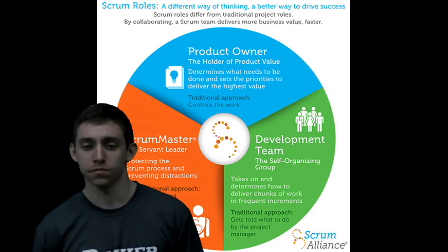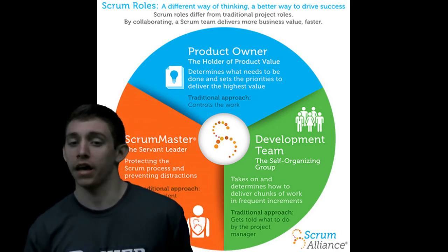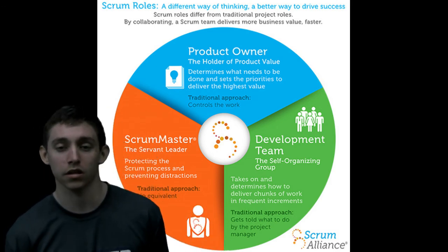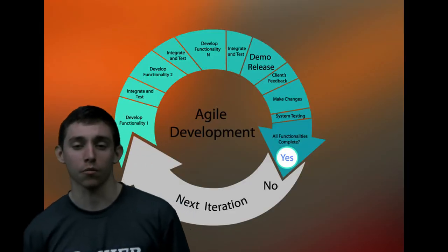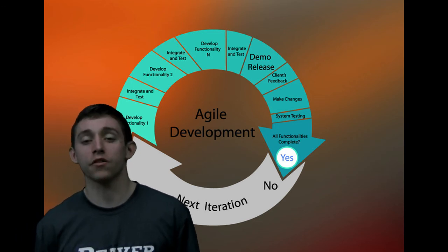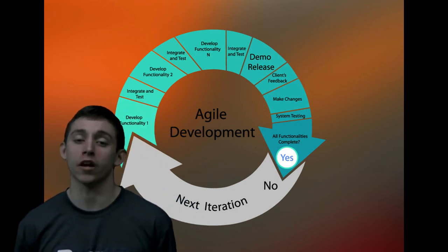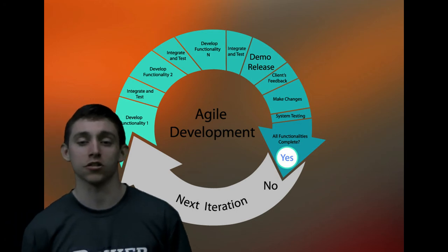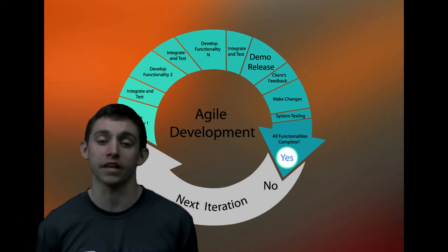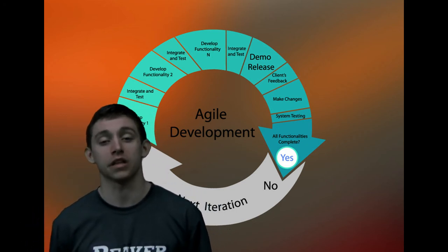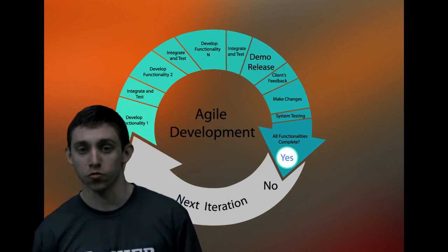The Agile methodology builds software applications that are unpredictable in nature, iterative, and incremental. Work cadences called sprints are used in this methodology. Both Agile and Scrum follow the system. Now, some of the features are developed as a part of the sprint, and at the end of each sprint, the features are completed right from coding, testing, and their integration into the actual product. A demonstration of the functionality is provided to the owner at the end of each sprint so that feedback can be taken, which can be helpful in order to make the next sprint more useful.